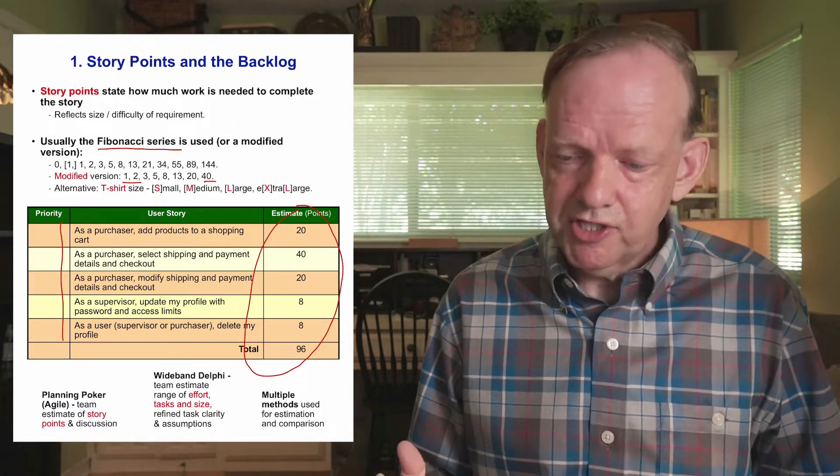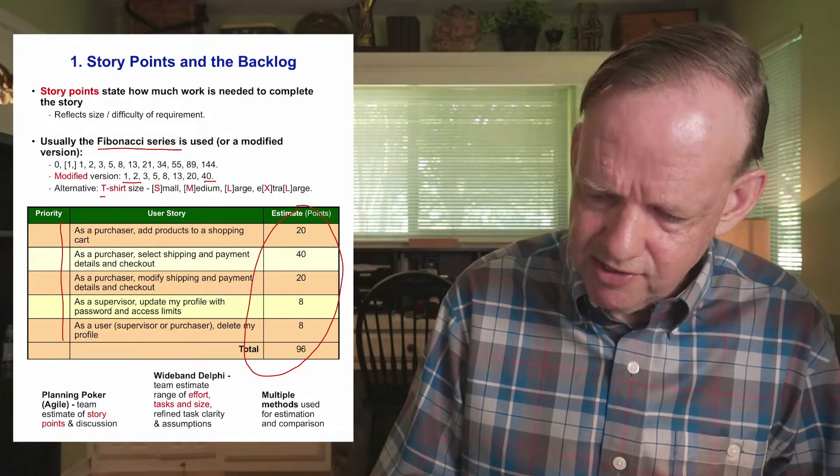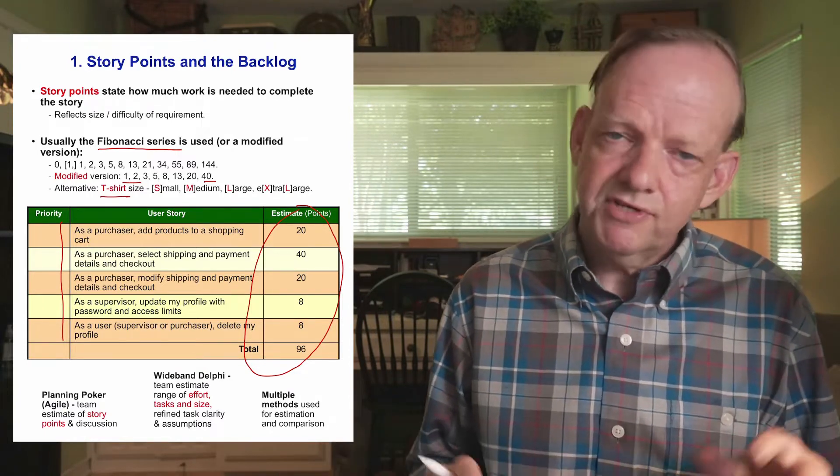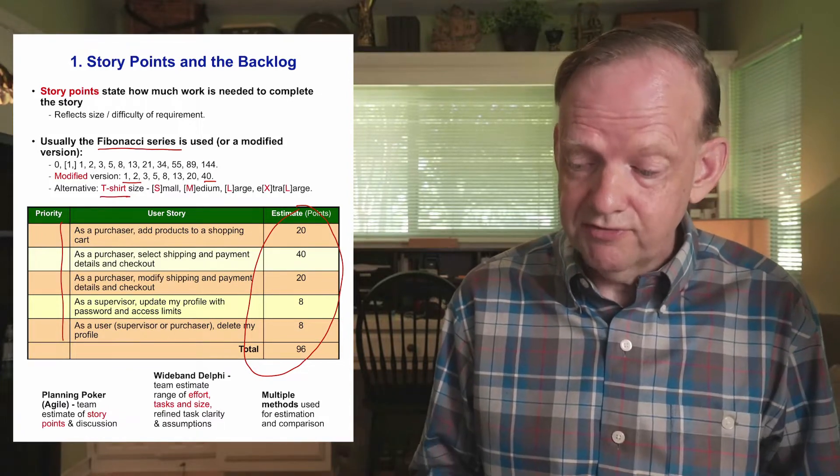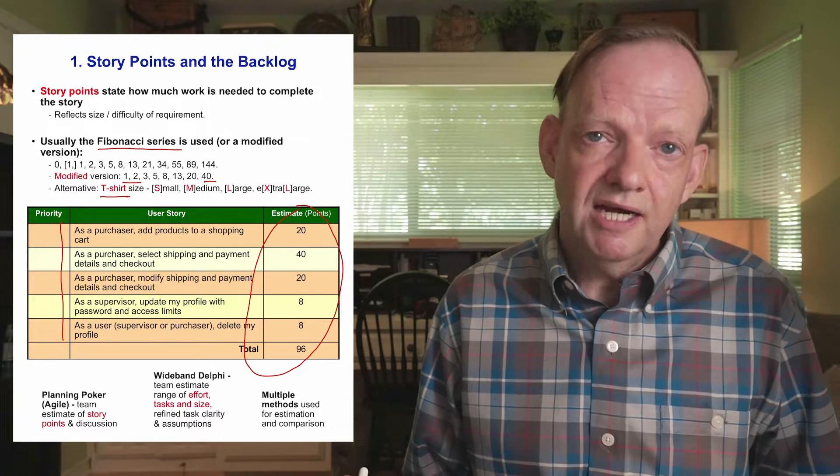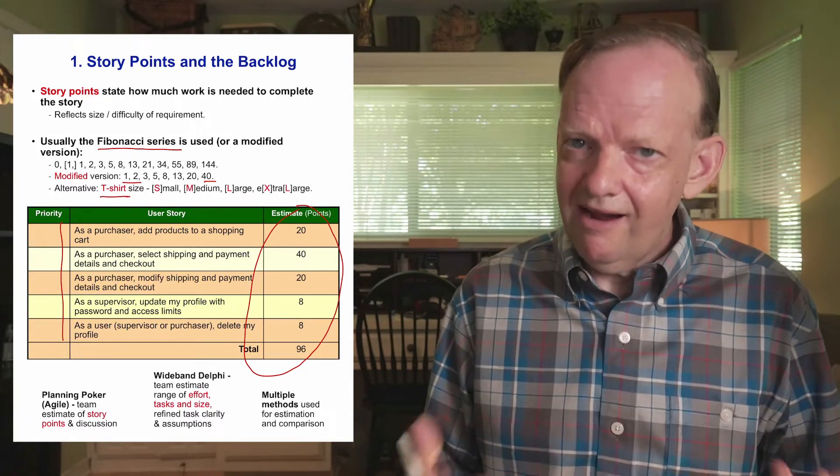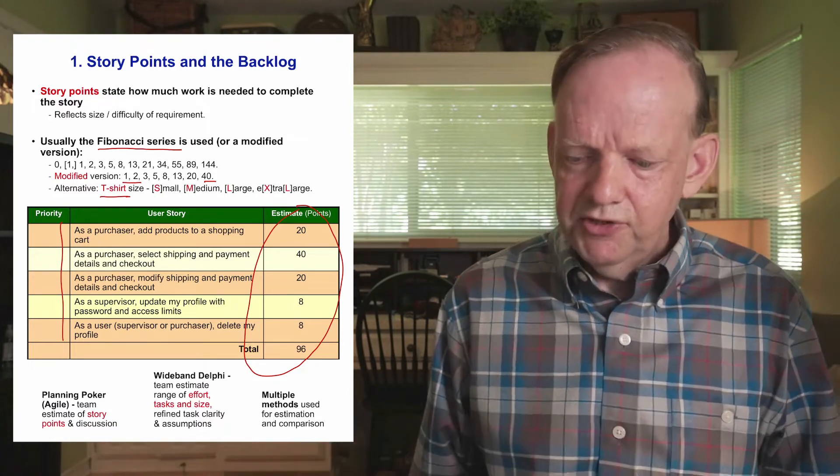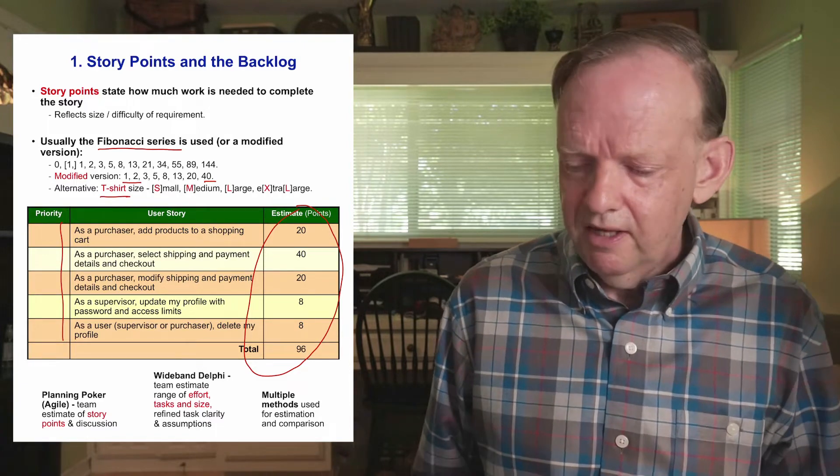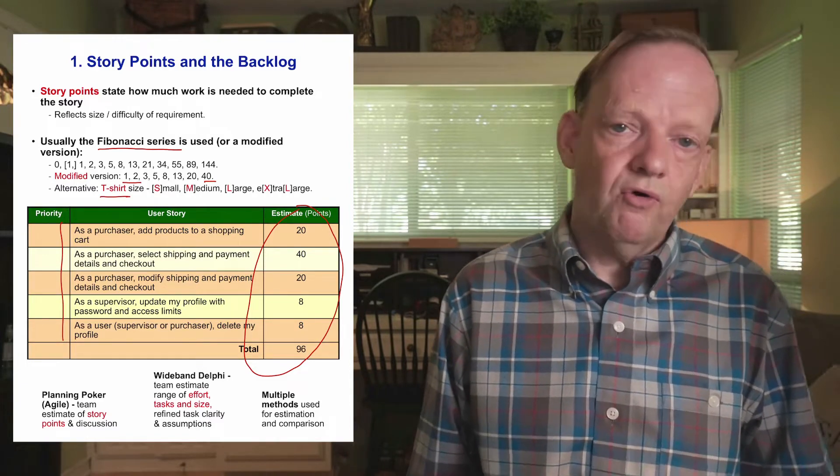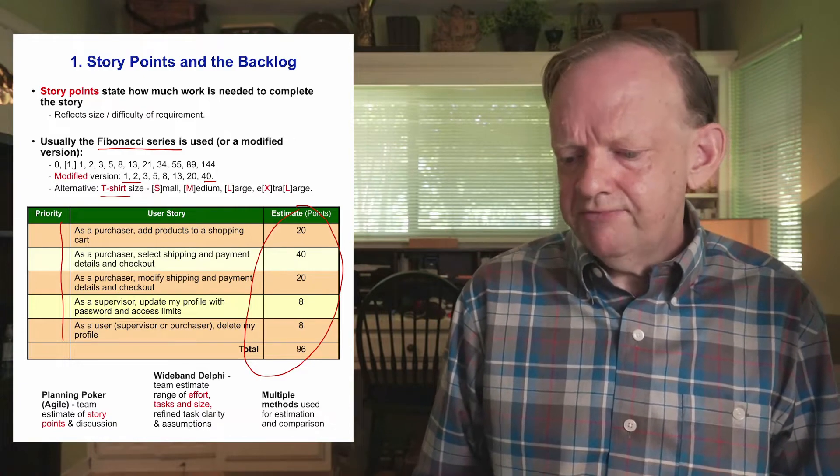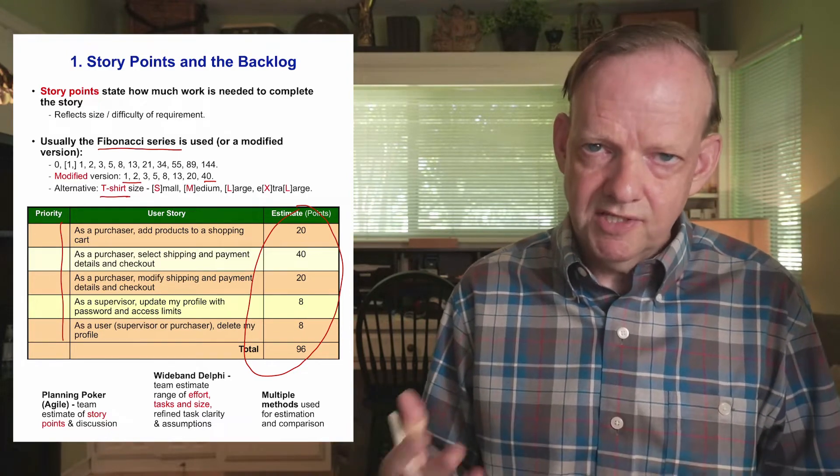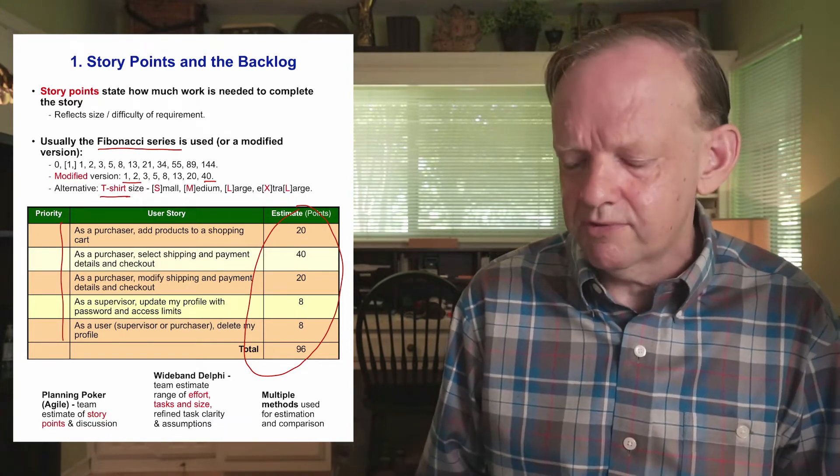Some teams don't use Fibonacci. They use an alternative, like t-shirt sizes, where they have small, medium, large and extra large. This is a relative discussion of the magnitude or size of the item on the backlog. The downside of a t-shirt size is that you really can't calculate anything with that because small doesn't mean two weeks or four weeks or ten weeks. You have to recalculate in a number system to derive effort or labor or schedule. I would at least use a number system where you can calculate velocity and other things with the numbers later on.